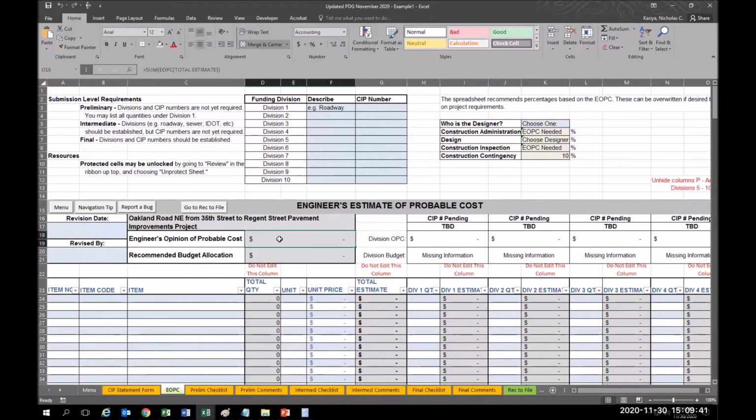As you can see, when I click on this gray cell, it shows a formula for where to pull this information from elsewhere in the document. Filling out this worksheet is a critical path item for completing several bid phase documents, including the recommendation to file, 300A, 300A funding, and the recommendation to award.